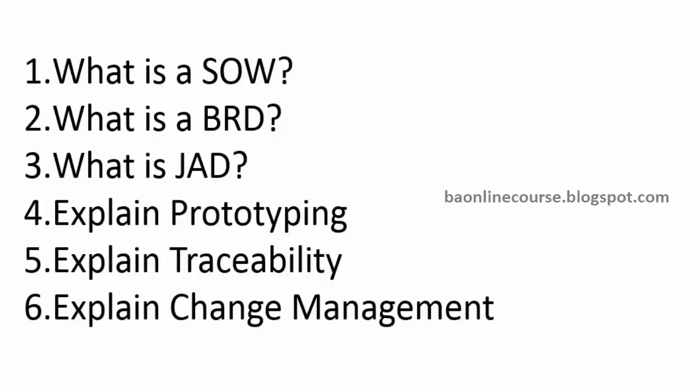Then you can go about and say, prototypes are classified into throwaway and evolutionary prototypes. Throwaway are the basic ones where we create the sketches, and evolutionary are the more advanced ones where we create using HTML with the help of a developer and all. So you can get into the details about that. Okay? So that would be a better approach too. Yeah, go ahead. Next, traceability.